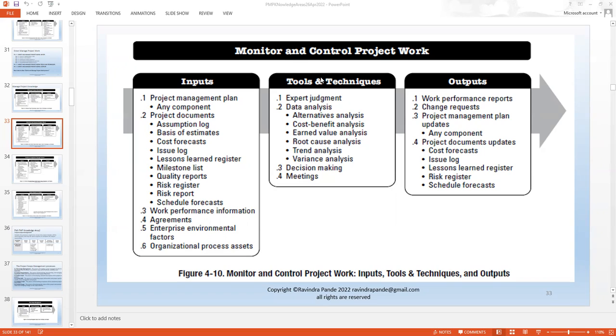If there's any deviation, like somebody is not well, so I have 5 resources and 6 tasks are planned, I normally try to absorb the leave or the absence with additional temporary resources, normally lent from another project team, or depending upon the company policies and procedures, I'll try to manage that additional task as well.